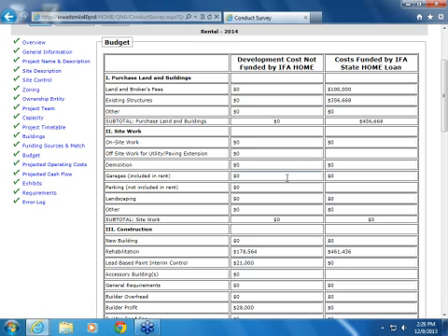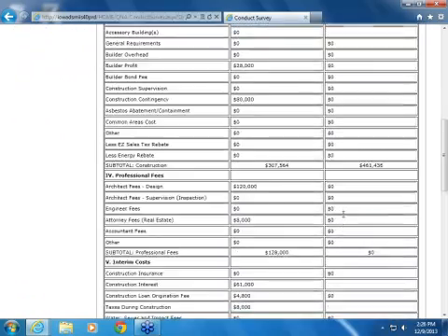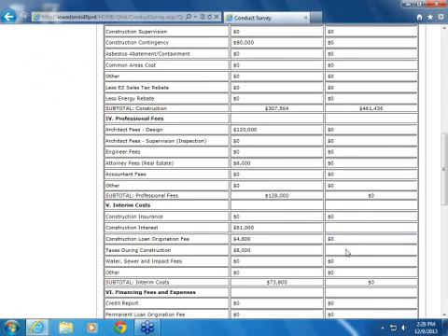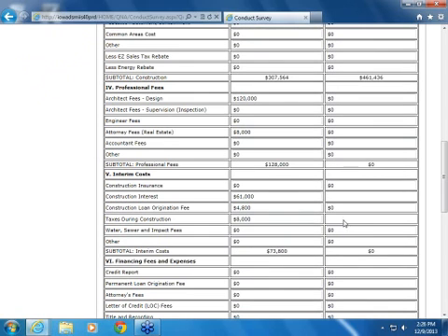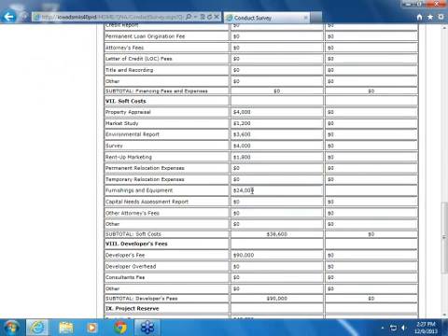Once you go through the budget here, you will see, for instance, we were talking about items that didn't qualify for home. You'll see here that underneath not funded by home is the area where you can enter costs for off-site work, but you're not able to do that over here in the home column. You'll see that in several areas. Parking that's not included in the rent. You'll see accessory buildings are not an eligible expense. Construction interest is not eligible. Taxes during construction. So those items that don't have a blank there, there's a reason for that. It's not home eligible. So once you go through your entire budget, soft costs included, you'll see furnishings and equipment, one of those things that's not home eligible.